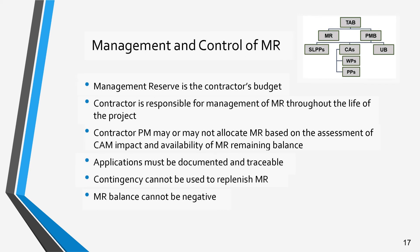The contractor PM must ensure that MR will be used prudently during the life of the project. Depleting MR while there are significant project risks greatly increases the chances of a contract overrun and is an early warning sign for a probable over-target baseline. It is important to note that MR is never required to be allocated. MR allocation is subject to the PM's approval based on the CAM's definition of the requirement for new scope and any project impact, and whether any MR remains that is available for allocation.